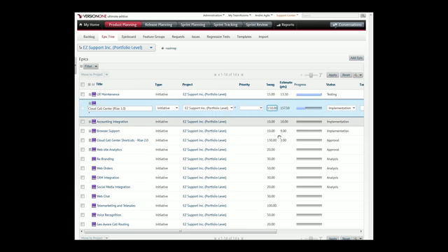The other element that's partly in that question is, what are the right units to use for the swag? I think some organizations will try to change units to talk about man months instead of using story points, or some might want to use dollars because the portfolio level team is focused on dollars. There is some benefit to being consistent with your units, because then it makes it very easy to do comparisons. You might find that your approach to doing your initial swag isn't using story points, and you're doing a conversion from man months to story points.